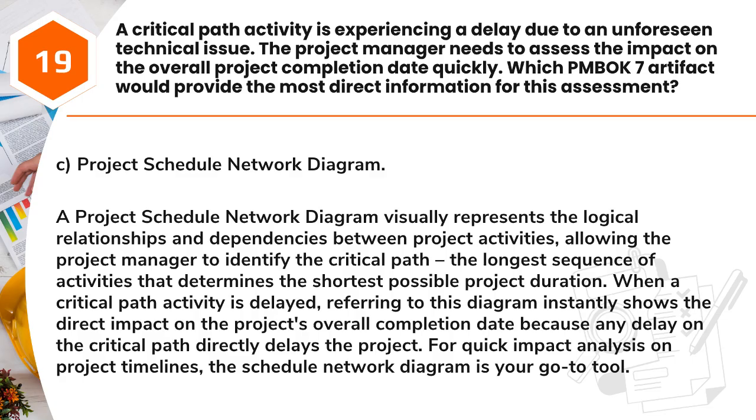A project schedule network diagram visually represents the logical relationships and dependencies between project activities, allowing the project manager to identify the critical path, the longest sequence of activities that determines the shortest possible project duration. When a critical path activity is delayed, referring to this diagram instantly shows the direct impact on the project's overall completion date because any delay on the critical path directly delays the project. For quick impact analysis on project timelines, the schedule network diagram is your go-to tool.